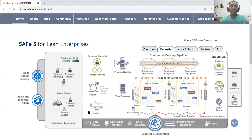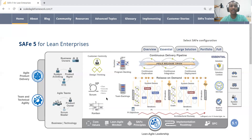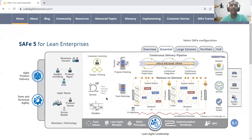Moving a bit to the right, we have Scrum, XP, and Kanban clustered here. When we say the agile teams are part of the Agile Release Train, the teams have the flexibility and the option to pick and choose which concepts they would like to use. The teams could be using Scrum, Kanban, or Scrum along with XP to focus on quality practices as well. At the release train level, all teams should be focused on a common cadence, common timelines, and continuous integration.